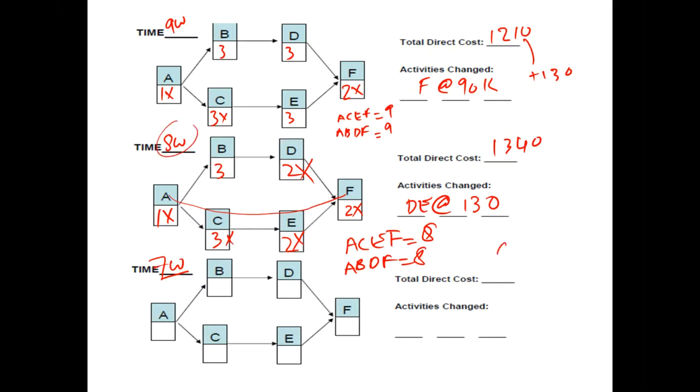So you have reached a situation where your critical path cannot be crashed. So this is basically the end of the road for us. We have reached a situation where the most important critical path cannot be crashed. So we cannot deliver this in 7 weeks because the path at the bottom will still be there. So the project will take 8 weeks again. So this way we saw that we have worked out different options based on the direct costs.